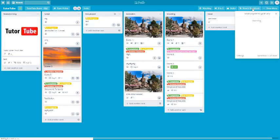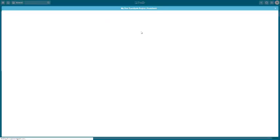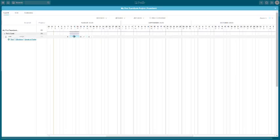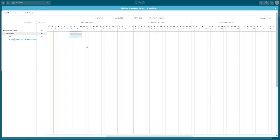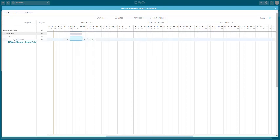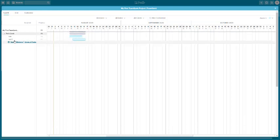Click on 'View TeamGantt' and then 'View in Gantt Chart' to see your Gantt chart. You can visually control it — click and drag to readjust tasks. You can also add tasks directly here, like 'Task 2,' and add another Gantt entry and manage it directly from the Gantt view.